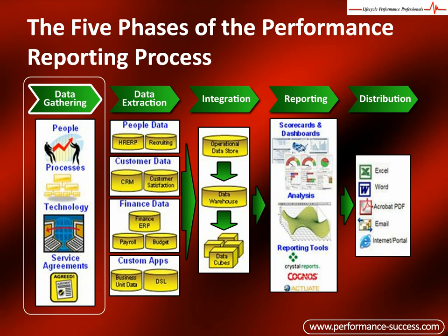Number five: the data gathered should be a reasonable representation of the whole process. For example, it would not be a good idea to gather data over a bank holiday or only on Monday night shift. Number six: don't reinvent the wheel — if the data you require already exists in an accurate, usable format, all you need to do is map to it. If it doesn't, you will need to design a method of gathering that data.